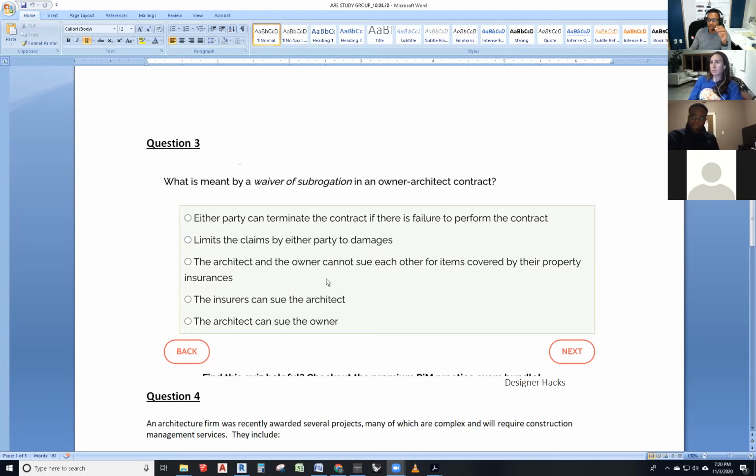All right. So, and then there is this other term called liquidated damages, which I've explained before. Liquidated damages is, well, Albelis, you're supposed to finish my project by Christmas because I'm gonna do a grand opening of my store in Christmas. If we don't open that project by Christmas, I'm gonna lose money because of your delays on that. I'm gonna charge you liquidated damages per day of my delay, but I'm also going to give you a bonus or some sort of an incentive for finishing any day before Christmas that you finish. All right. So that's the liquidated damages is the failure to meet the deadline.